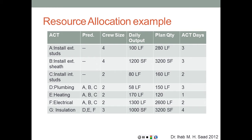The next step is to draw a histogram: on the horizontal axis is time, on the vertical axis are resource units. These are plotted based on crew sizes — in this case, labor is the resource being planned.